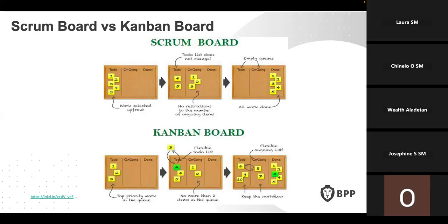You will do a refinement. So it's going to be a new sprint. Fine, they can come back. You can add them or even add new tasks to what was there before. But it's a new sprint. Not like when you started your sprint, you are on day 4, and I say, oh, there are some tasks we want to bring in. You don't do that for Scrum.